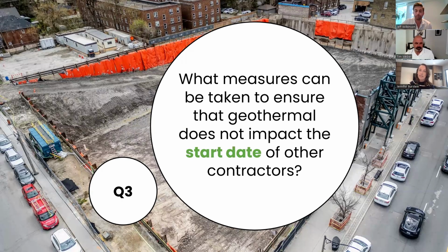Yeah, another thing we didn't touch on was the sequence of the activities and geothermal drilling being considered early works. So, is Diverso the constructor at the beginning of a project? Are they responsible for the notice of project until their activities are done and then it gets handed off to the CM thereafter? Or is the CM on the notice of project from day one and coordinating all those activities? So just other things to consider.